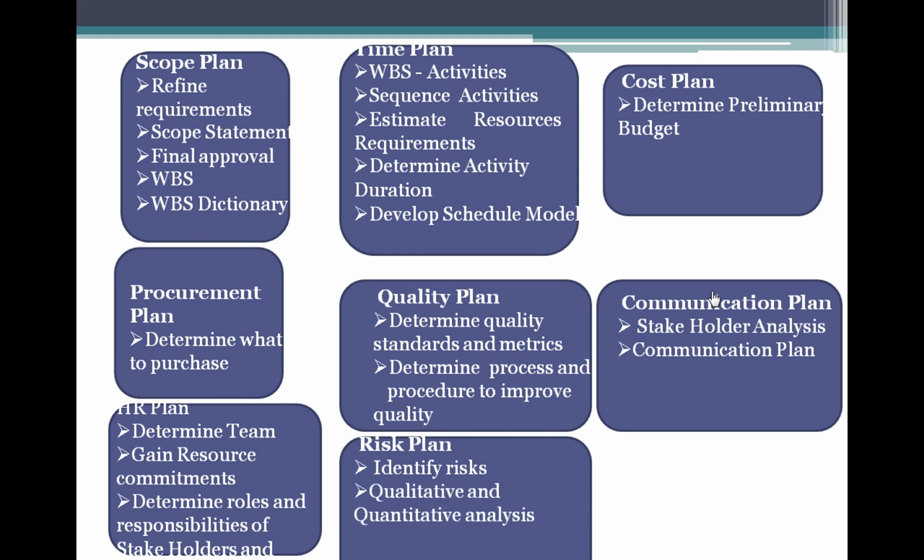Once risks are identified, you do a quantitative and qualitative analysis, which finds the probability of the risk and the impact of the risk on the project. So you do the qualitative and quantitative analysis, find the probability and impact on the project, and prepare the risk response planning.